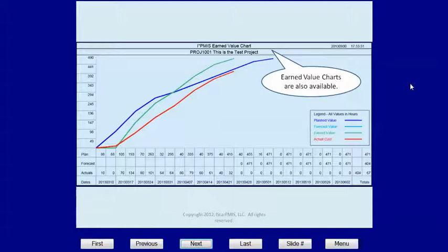If this were a project in process, you would have a forecast line mated with the earned value line. And they butt up against each other where the actuals have come in and where the forecast takes place. So this line would change color depending upon how much is forecast and how much is earned value. The red is actual hours spent, and it doesn't change. Neither does the blue color.